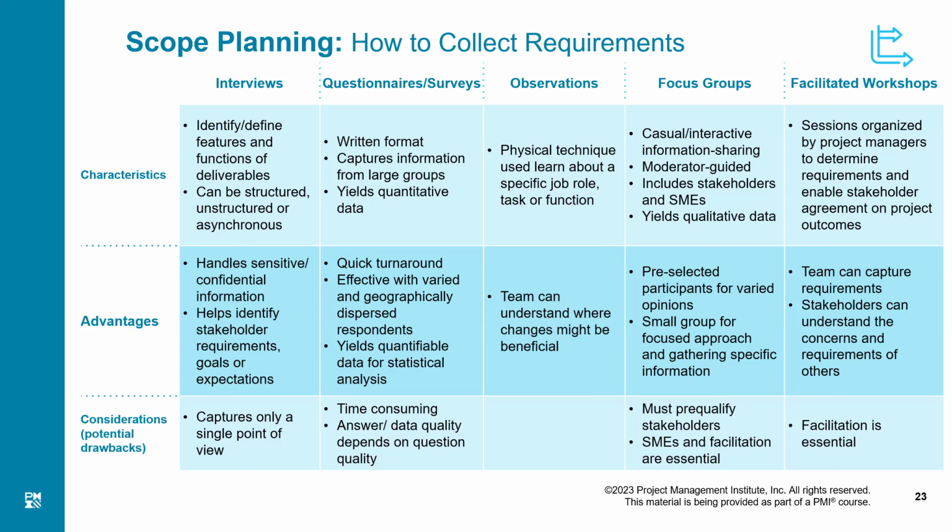We see what the common ideas in the top 10 are. And if there are many differences, then we send those ideas back to these people and ask them to shorten the list to, say, 5 ideas. By this to and fro movement, we are ultimately aiming at an anonymous consensus, where everybody comes up with the same 10 ideas. That is called the Delphi technique.